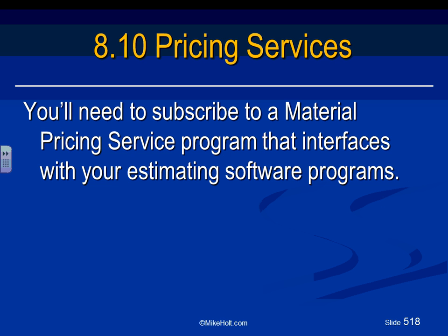Pricing service. Pricing service, anybody had to do pricing services, guys? Now remember that all the dollar values, Jeff, in the McCormick software and Accubid, somebody has to update these. The Excel sheet that I gave you guys, you yourself have to update it through your vendor. So I can give my Excel sheet to Werner Electric, and Werner Electric will update my sheet for me. If you have a software, most of the software guys have agreements with what they call pricing services that update the pricing in your software.